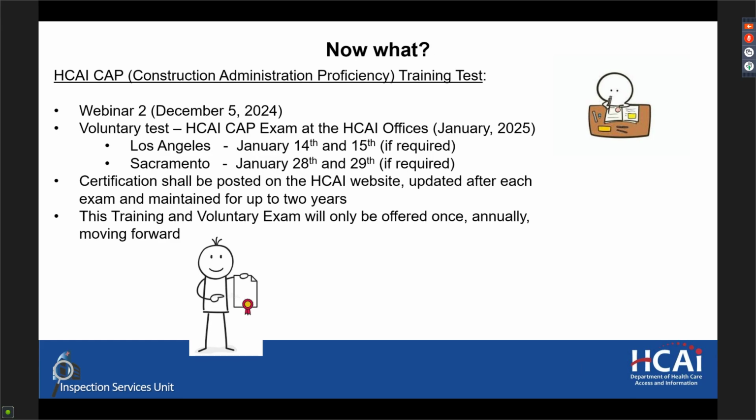So a functional program is used to determine the programmatic requirements of a project, and it's submitted with the original project application to the office staff for review. Compliance officers review functional programs. I know I do if I'm presented with an ACD that changes the scope of the project. I'll refer back to the originally reviewed and approved functional program to make sure that all those programmatic requirements are still being upheld in the project, even in spite of the scope change.